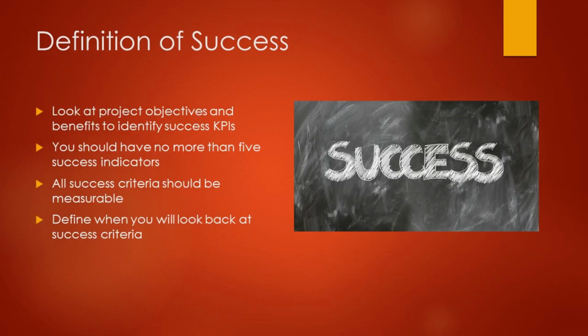Definition of success. You should always have it clearly laid out what the criteria are for this particular project being a success. For success criteria, you need to start by reaching back and looking at the objectives, opportunities, and benefits associated with the project. For example, if you make a tool as a result of the project and part of the value proposition associated with moving forward and creating the tool is that this tool will make it possible for your company to generate widgets twice as fast, then you would want to clearly state within the success criteria that part of what will make this project a success is if this tool generates widgets twice as quickly, among other things.